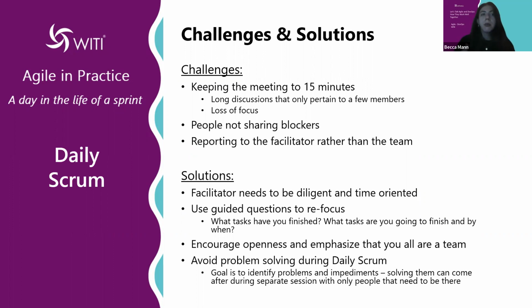A lot of times with these blockers, other teammates would help them resolve them, or they have a bug that another team member would be able to help resolve. So talking to the team and making it feel like a team environment is really important, rather than saying, you're reporting to me, I'm the facilitator, tell me your progress. You report to the team, because as a team, we are delivering this product for this sprint.